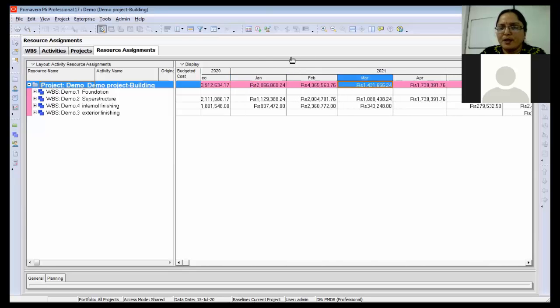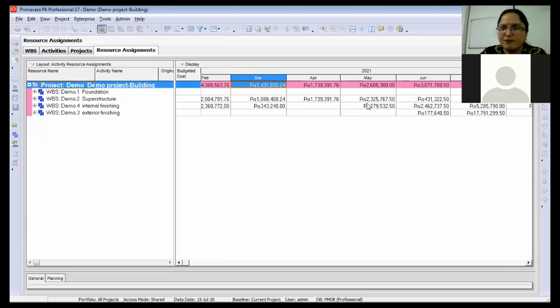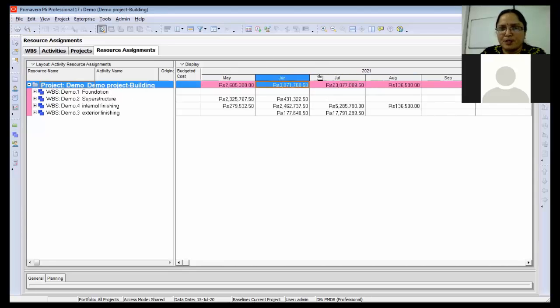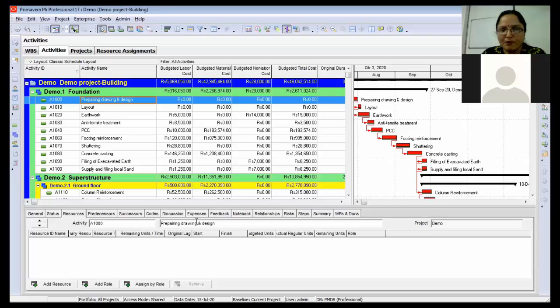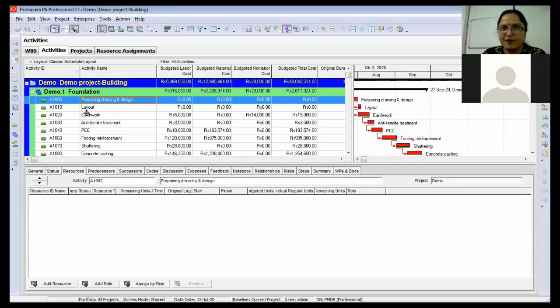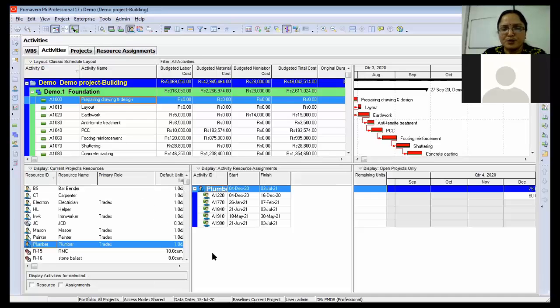So this is showing in your Excel. We can even view the S curve of your project. Hope you already know S curve is nothing but the cost baseline, that is the cumulative cost we are spending on our project over time. That also we can view easily. We can view our resource histogram also, how much resource we are using, where and when. All this information can be easily viewed using this software.